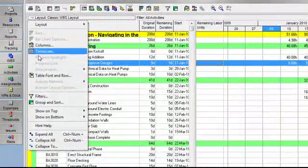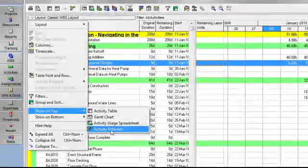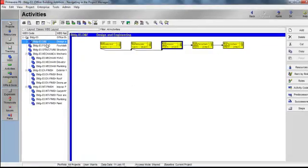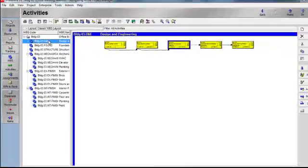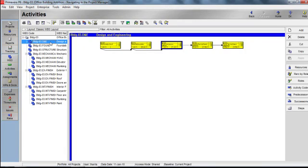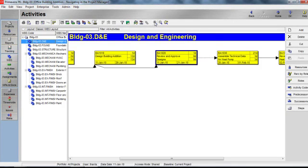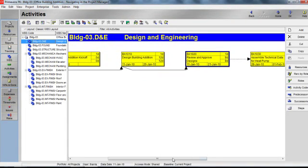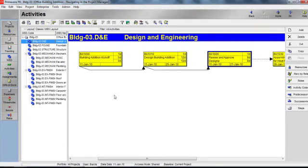Let's go back to our Layout Options bar, Show on Top, and take a look at the Activity Network. The Activity Network lets you view relationships between activities to help you better understand the logic that's been built into this project. The left side of the window displays my WBS or Work Breakdown Structure hierarchy, and the right-hand side displays the activities for the currently selected WBS element. I can use the Zoom In and Zoom Out buttons on my toolbar to magnify, or I can depress the Alt key on my keyboard and click and drag my mouse to selectively magnify.